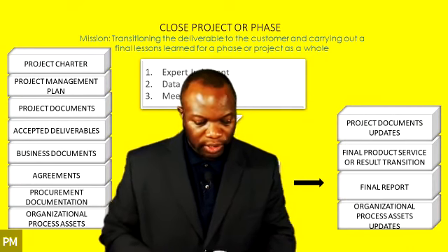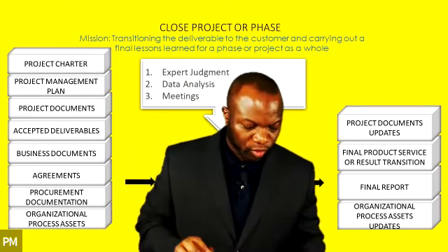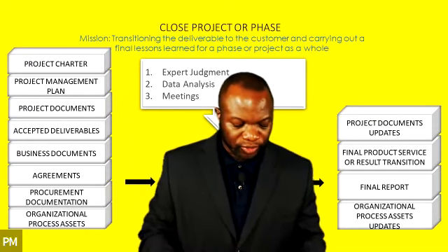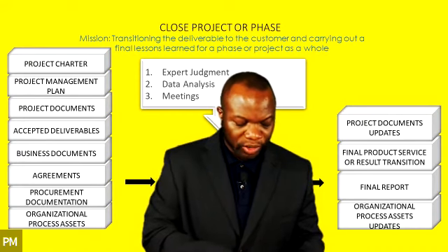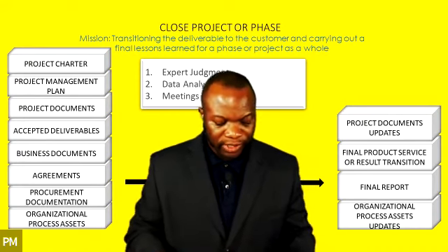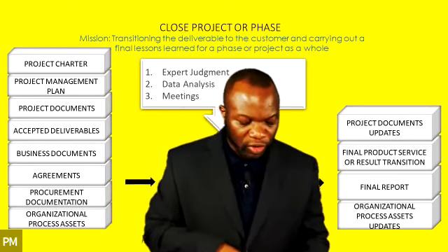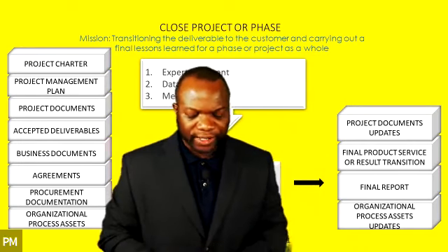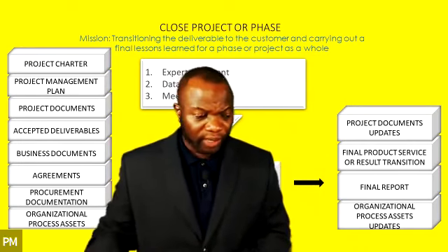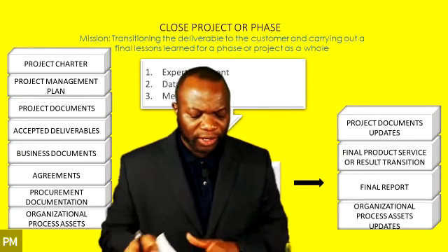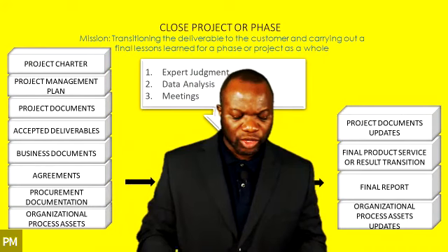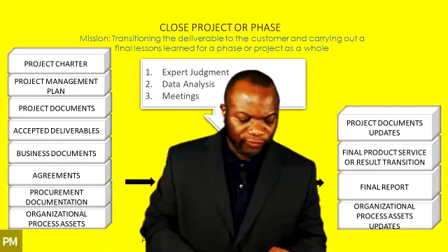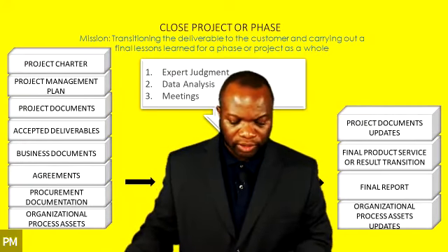12.3.1.4. It says here, procurement documentation contains complete supporting records for the administration. It says procurement documentation includes a statement of work, payment information, contractor work performance information, plans, drawings, and other correspondence, whatever that is. That's a big old bucket for anything we label as procurement documentation. Probably not the RFPs and RFQs in this instance, but centered more on the statement of work and the operating information for the procurement. All right, so that one's a new one.